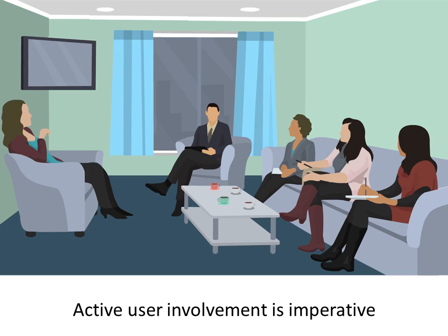In fact, we have seen several projects which were not so successful or were unable to produce the best result despite having a great team and following the rest of the Agile principles, just because the product owner was too busy to provide enough time to the team. And even though he was ready to write down the requirement or spend a specific time in the week, not really getting involved on a regular basis, on an as-needed-by-the-team basis, did not help in achieving the ideal output that you would want in an agile project.